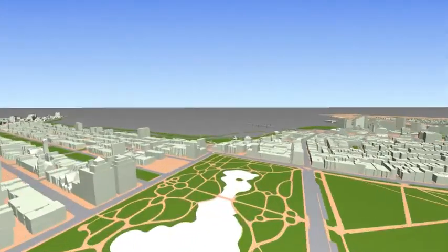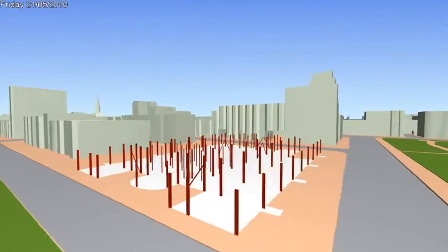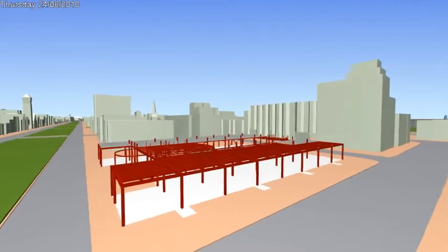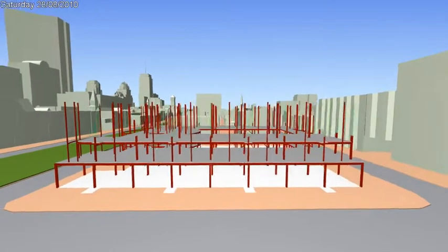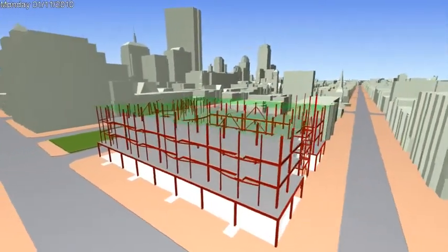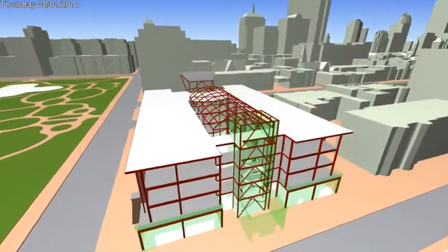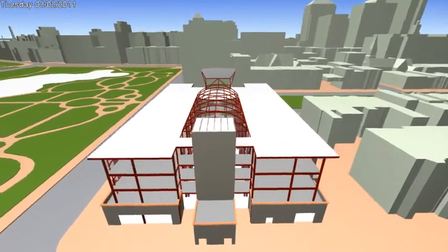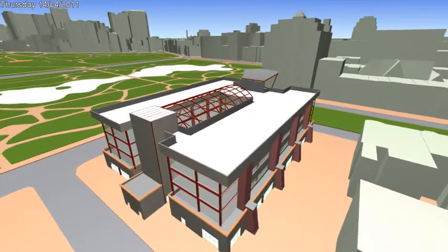Here we see virtual design and construction specialists and construction managers using Navisworks to create a multidiscipline model, integrated from architectural, structural, mechanical and civil engineering models and specialist trades. This can then be further integrated with construction schedules for 4D simulation like this, enabling the project to be reviewed and analysed by all stakeholders in both space and time.